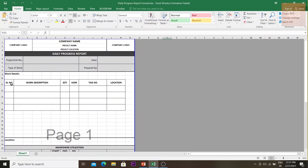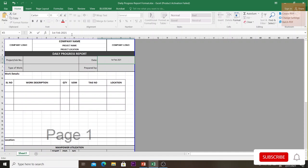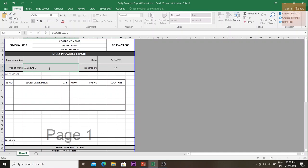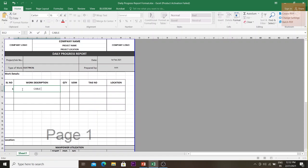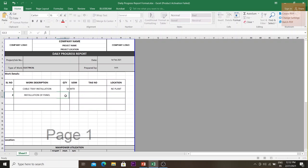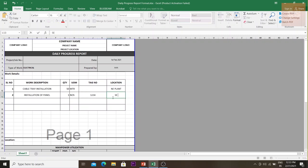For example, on 1st February 2021, prepared by 'AAA', type of work: electrical — cable tray installation. The quantity installed was 50 meters; no tag number is required for linear items. The location was the northeast plant. Additionally, one panel was installed — you can give the tag number of that panel, such as '1234', located in the southeast plant.